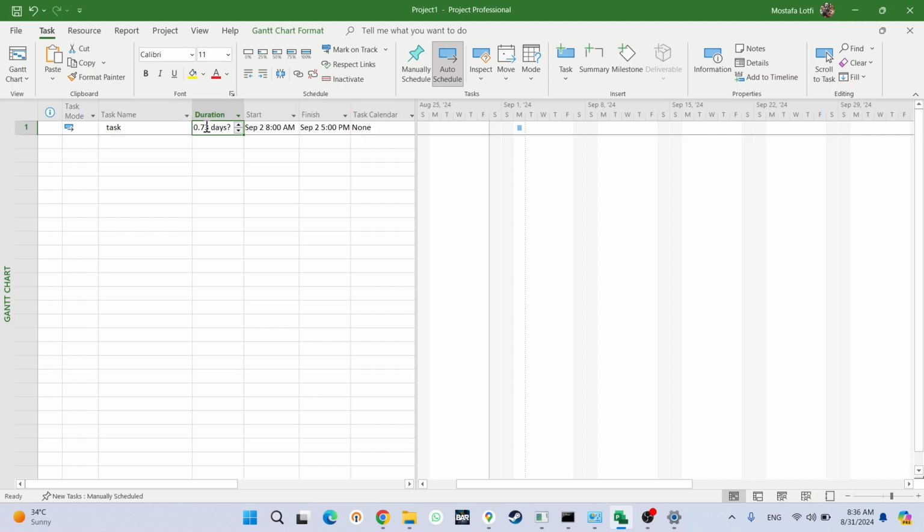So what happened is you need to manually update and correct them. That's why it's very important for you to make a clean, correct calendar before you start data entry. Imagine you didn't have only one task, you had around 2000 tasks on your project, and you suddenly find out that, oh, I messed up the project calendar. It requires a lot of work to clean up. Well, there are some tips and tricks that you can use to reduce the pain, but still it's painful.